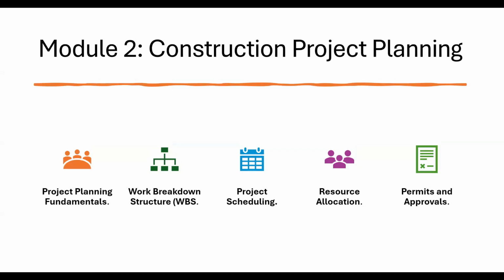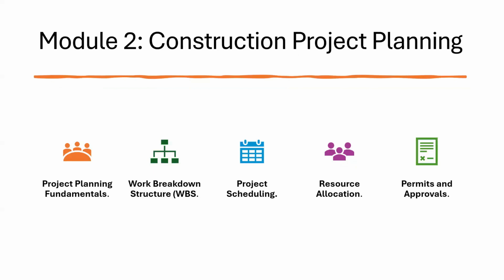And in the nature of how construction projects are undertaken, if you don't have full feasibility of your project, then it will be difficult for you to execute it appropriately. So you'll be able to look at the project planning fundamentals, the work breakdown structure, and the work breakdown structure comes in after you have been able to get full feasibility of the project, that you know what is included and what is not included, that you understand the boundaries of the project.